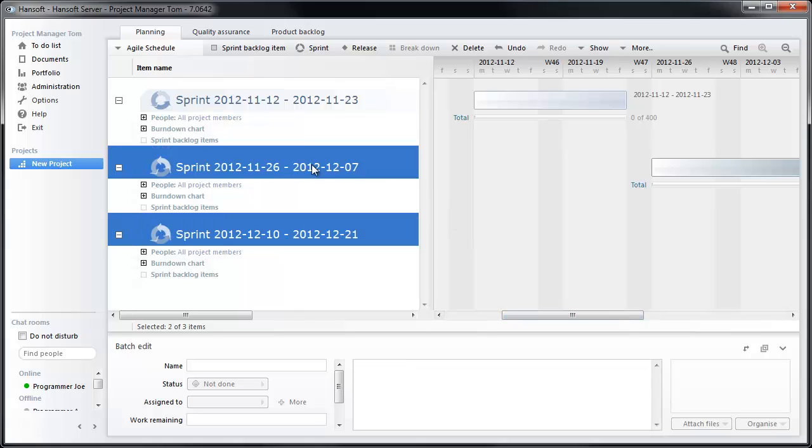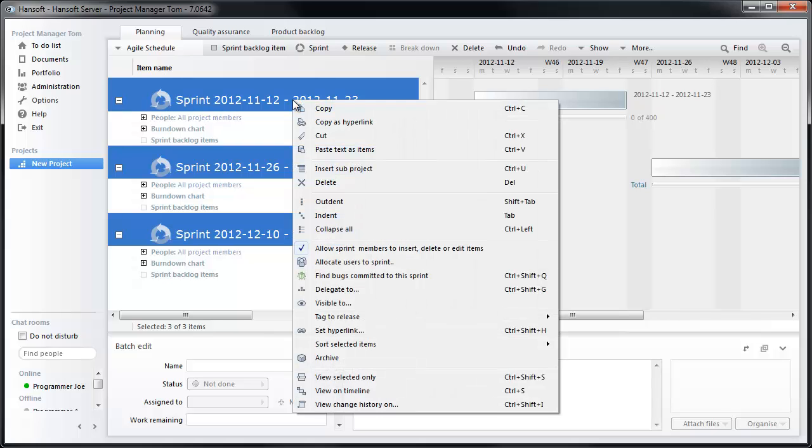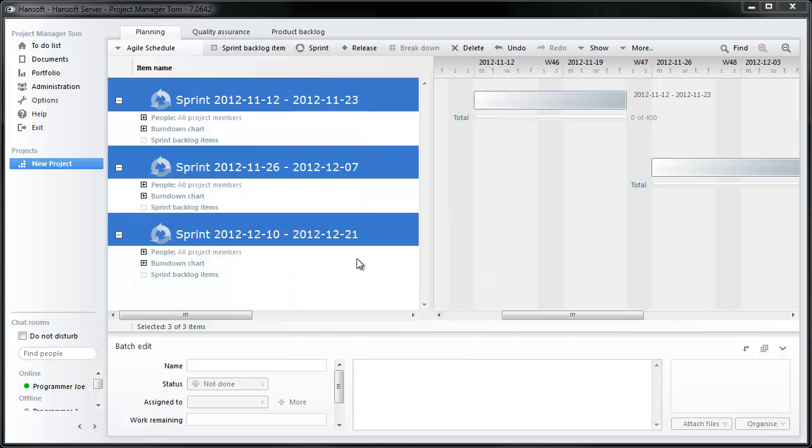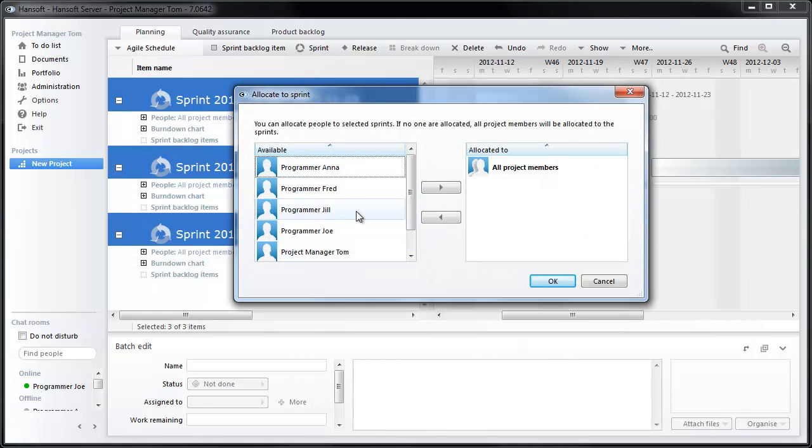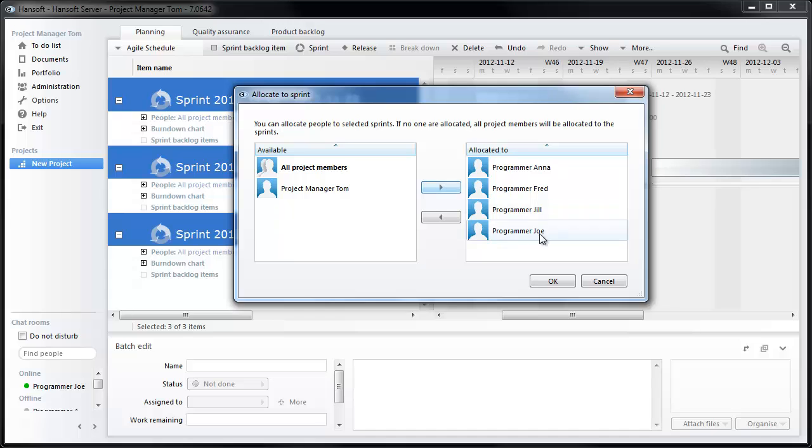By selecting these three sprints, I can now assign team members to these sprints. Right clicking here and allocate users to sprint. By default, everyone in the project is assigned to the sprint, but as a project manager I'm not going to be involved in doing the work. So I'm just going to select the programmers and add them to the sprint.